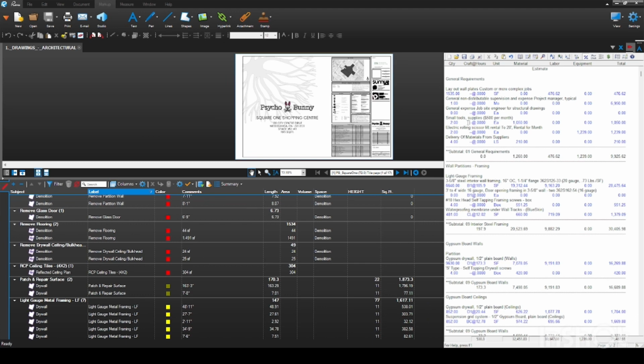So here we go for small tools, any items or miscellaneous items I think I'll need throughout the project. I don't think I'll need a lot of stuff. I have everything, but I may need to buy some discs or drill bits. Who knows? So I'll put in around $500 of miscellaneous items. I need some scissor lifts to make sure I can get up to the ceiling, install any top tracks or do any work that needs to be done overhead. And deliveries, probably need 4 deliveries. I think that's a lot. Probably do it in like 2 deliveries.